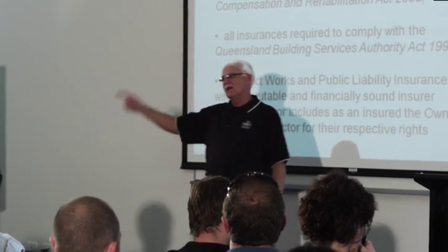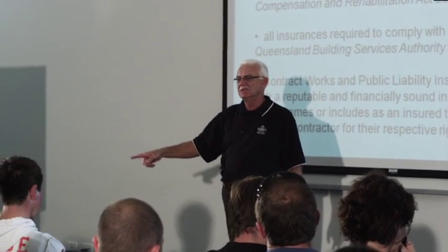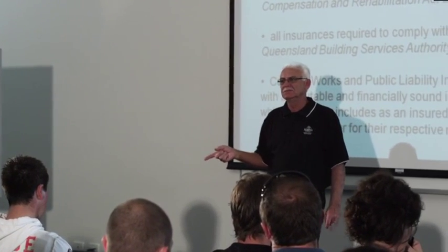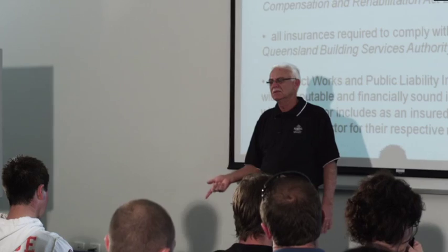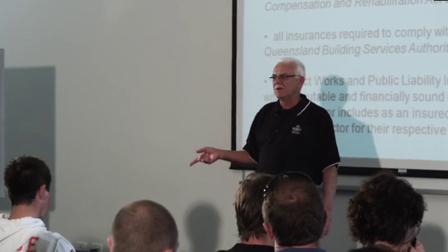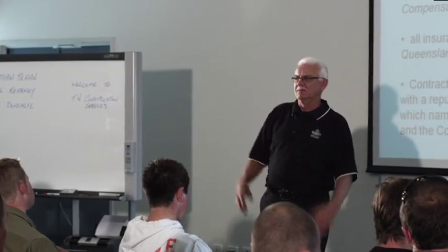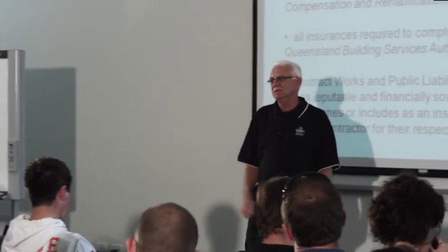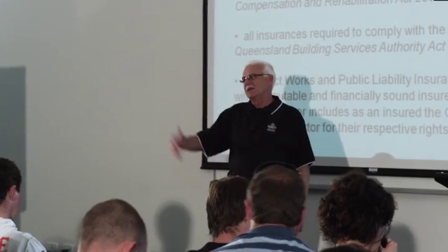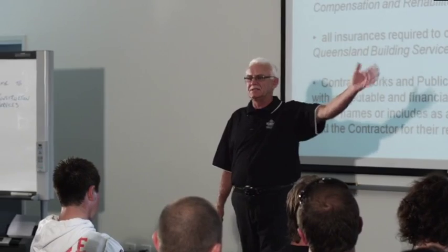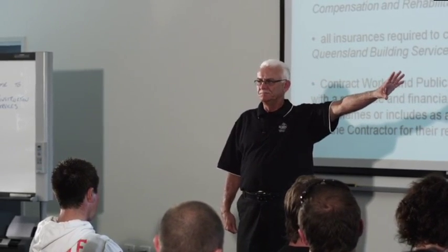If the BSA go out there and do an inspection and deem it as being a builder's fault, a category 1 defect, they will ask you to rectify it. You might decide, no, bugger it, I've had a gutful of them, I'm not going to rectify it. They don't care whether you do or they don't, because what BSA will do is they will go and get someone to do it for them.